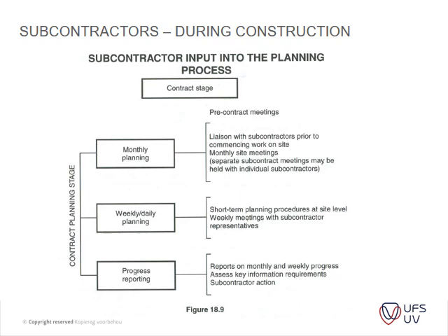Okay, then the program, the input of subcontractors during construction. We've got the contract stage, that's now finished. So then you've got monthly planning, weekly planning, and then progress reporting. So you can see it's very similar to the same way the professional team sits with the main contractor, the main contractor sits with the subcontractors.